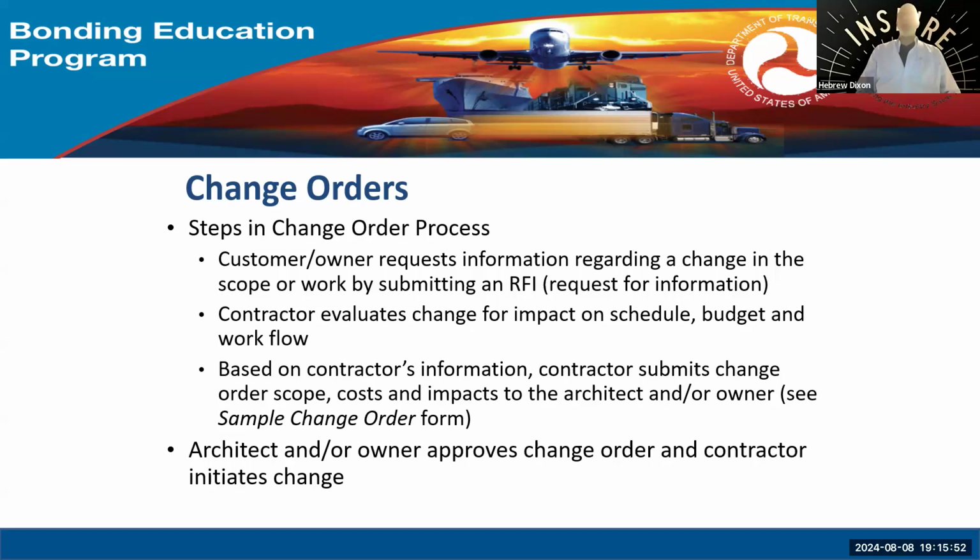Now, everybody has these wonderful programs, all kinds of programs for tracking stuff. At the end of the day, an Excel spreadsheet works, as long as you check it every day. RFI has a number, RFI number 1, RFI number 2, right? That request, I'm going to give you this kind of high level one. So an RFI is just an RFI. You do that in a way that makes sense, to make sure that you are really clear that you want to, at some point, ask for money.